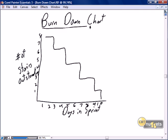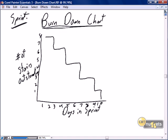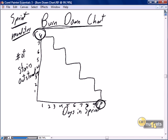Our next information radiator progress chart is the standard burn down or burn up chart for the sprint. I would say these are mandatory — you don't need both, so pick the one you prefer: burn down versus burn up, downward trending versus upward trending. Make it mandatory, because this is the true information radiator that's going to show your actual progress. There's no imprecision in these: we've completed our sprint plan, we absolutely know there are eight stories to be completed in this sprint, and we absolutely know there are ten days in the sprint. So all the imprecision is gone.